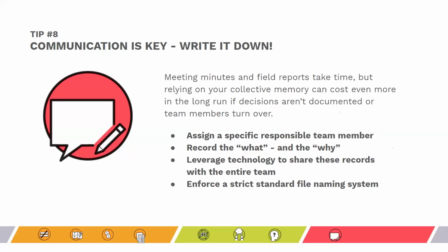So our team ended up spending way more time than we should have to investigate the project history. And ultimately, we ended up spending more money because we had to redo a lot of work that was already done because we couldn't find things and we didn't know what had happened. So this is a really important tip.